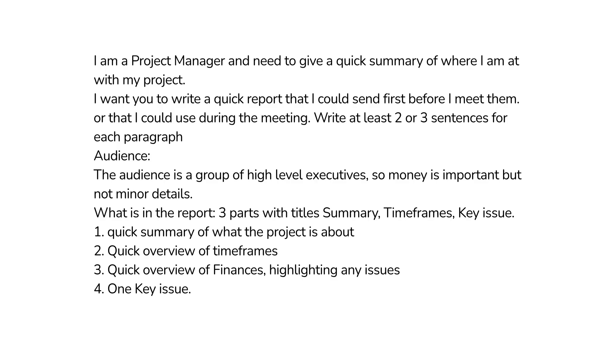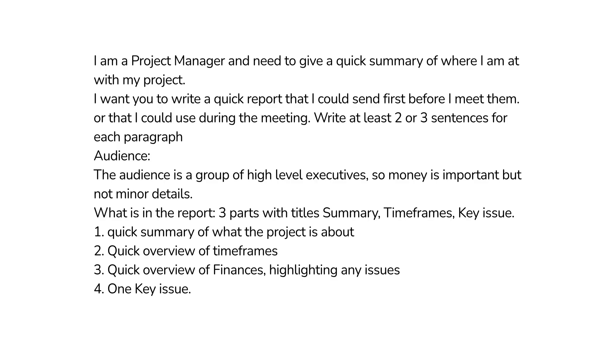I give this prompt: 'I am a project manager and need to give a quick summary of where I'm at with my project. I want you to write a quick report that I could send first before I meet them or that I could use during the meeting.' It's important to specify the audience is a group of high-level executives, so money is important but not minor details.